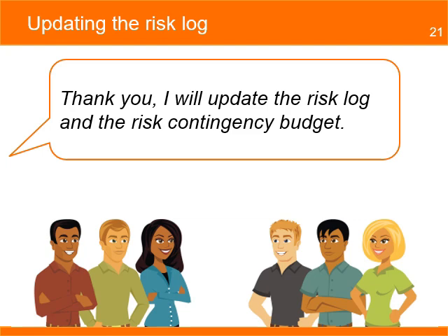You thank the team and take notes of the information they gave you. You will now update the risk log by changing the risk values for the initial 2 risks and add 2 new risks to the log. You also need to update the risk contingency budget.